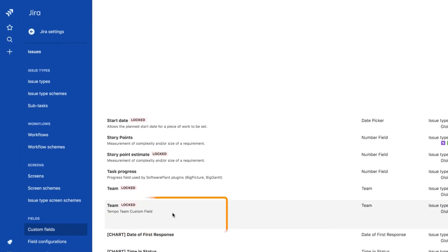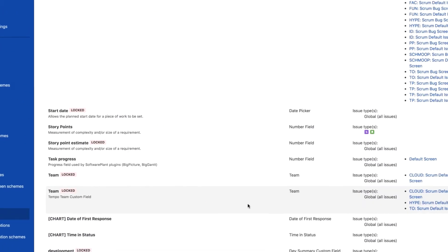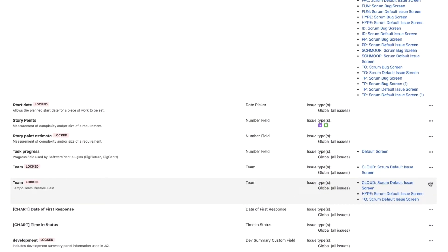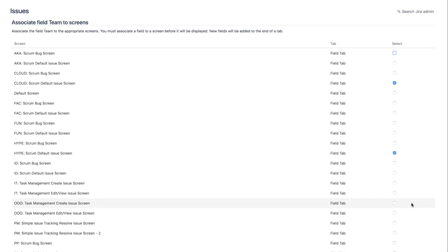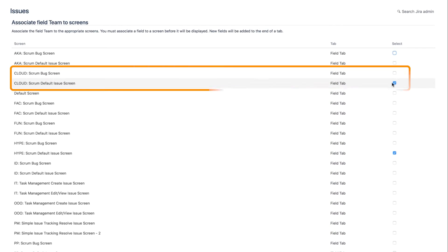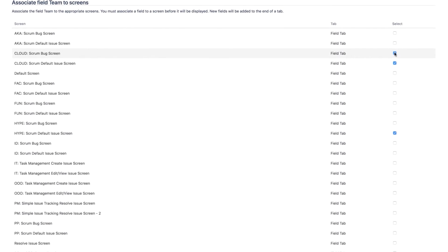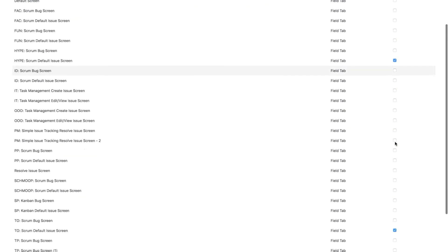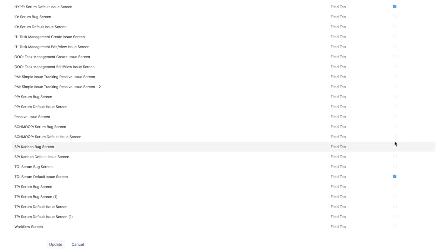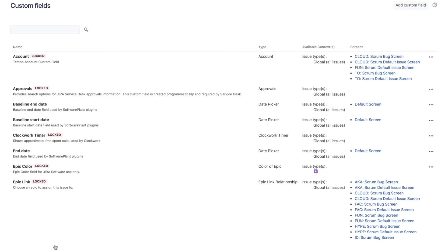Then they click the ellipsis to the right and select Screens from the drop-down. They check the boxes for the appropriate screens, in this case the ones used for the cloud project, which contains the Jira epic and issues that my team is working on. And they click Update to save these changes.